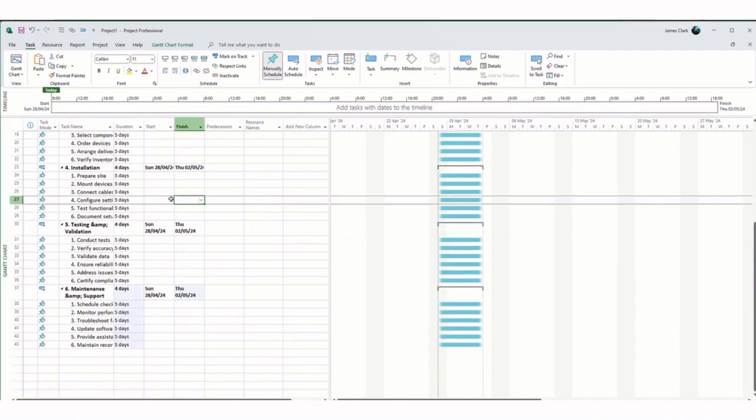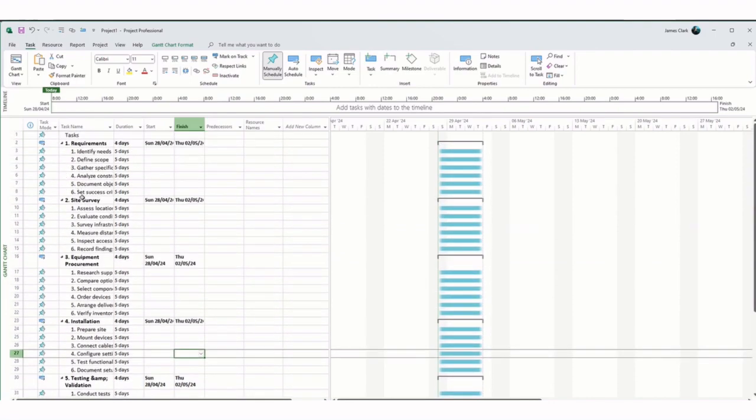So now it's time to put some sort of order in the way the tasks are happening. For the purpose of this exercise, I'm going to make this a classic waterfall style setup where each task is dependent on the previous task completing. So that will be for work packages as well as individual tasks within a work package.